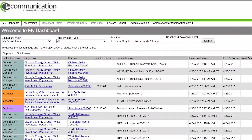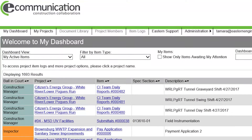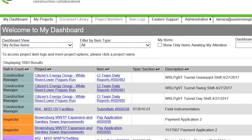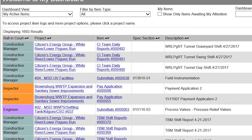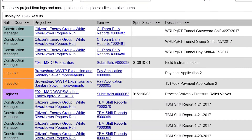If I'm a general contractor or subcontractor, I might have the ability to post an RFI or post a submittal. Whereas if I'm an engineer or an architect on the project, I'd have the ability to approve those documents, stamp and revise, and resubmit or continue that workflow.